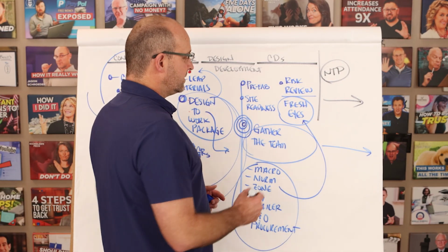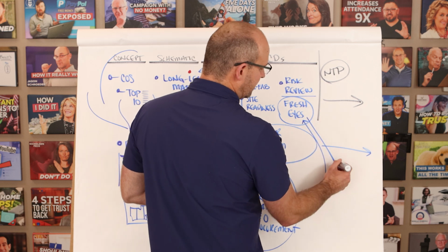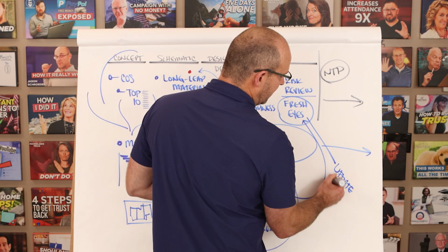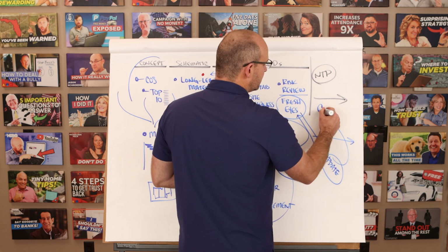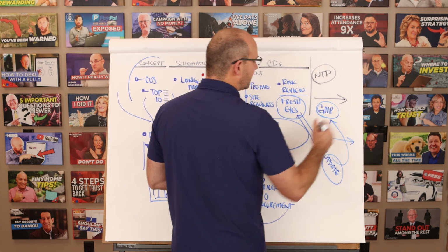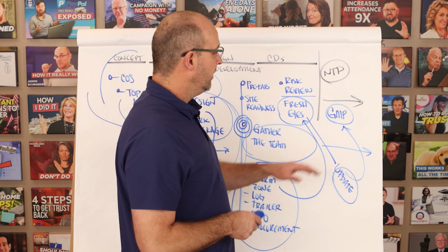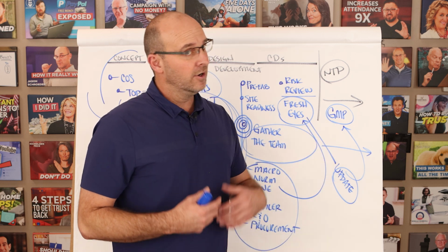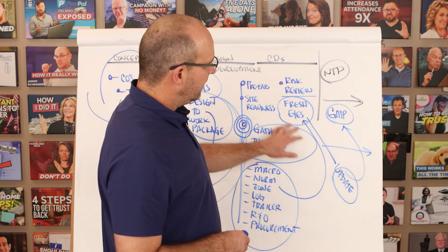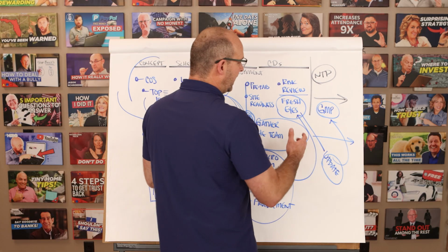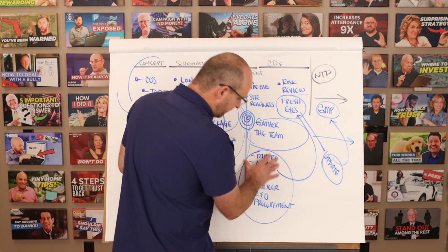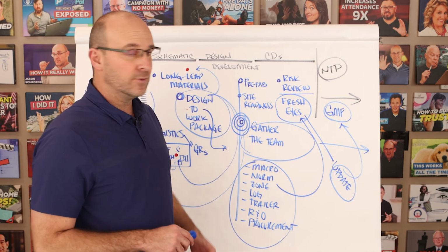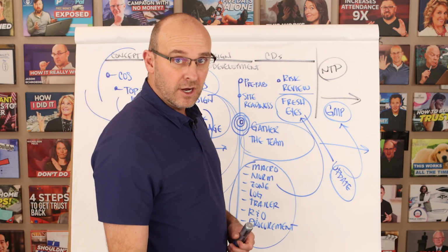And once you do the fresh eyes meeting, one thing that I don't want any of the teams to forget is to do your update to the plan, right? If any of these need to come in to the prime agreement, either included in the prime agreement or in your actual GMP submission as an exhibit or an attachment or anything like that, we would want to have that updated. We have all of the final planning tools that we need to go start the project so that we can start the project off on the right foot.